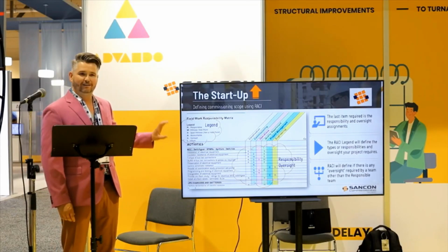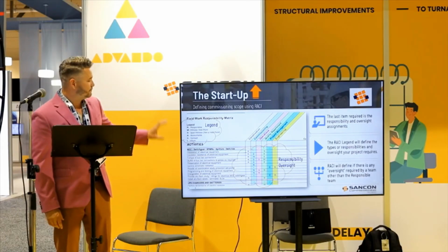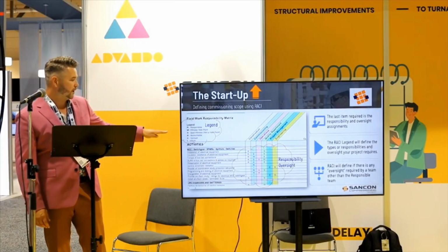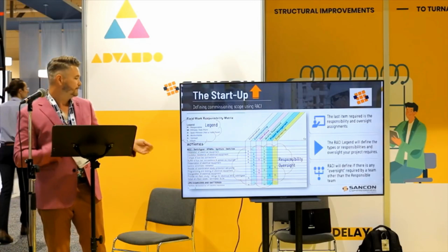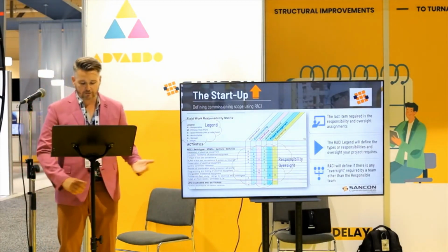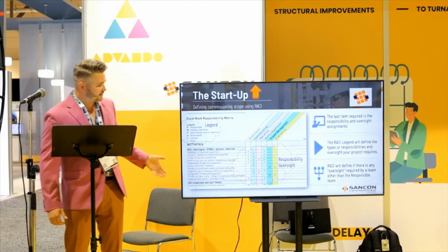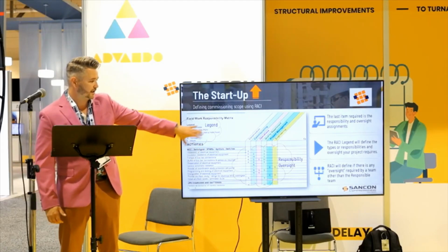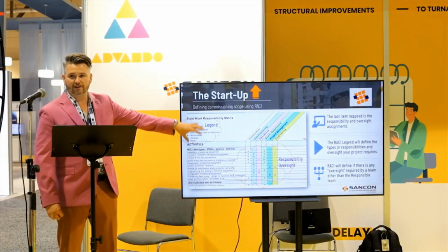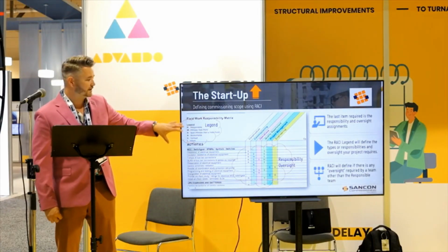You can use this however you like, but in this case we're using the acronym of responsible, witness, hold, spot witness, which is not a hold point, accountable, consult, and inform. Now, with this legend, it's key that these get held within the project and parties. There might be several responsibilities within a project and several holds, but we need to have it clearly defined